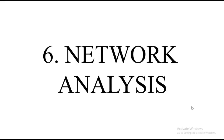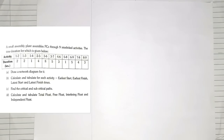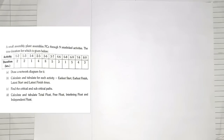The next topic is based on Network Analysis — specifically the sum based on Critical Path, which is the simplest topic of all. A small assembly plant assembles PCs through nine interlinked activities with given time durations. They ask us to: (1) draw a network diagram, (2) calculate and tabulate earliest start, earliest finish, latest start, latest finish time for each activity, (3) find the critical and subcritical path, and (4) calculate total float, free float, interfering float, and independent float.